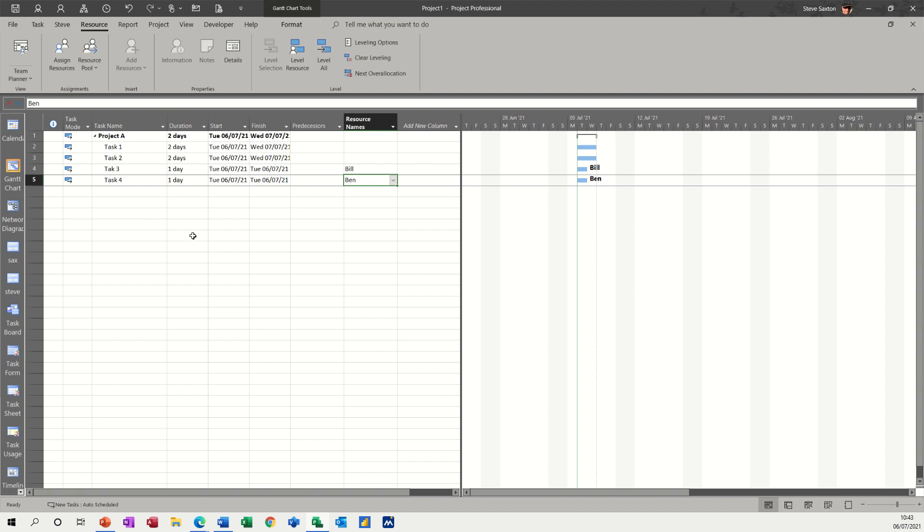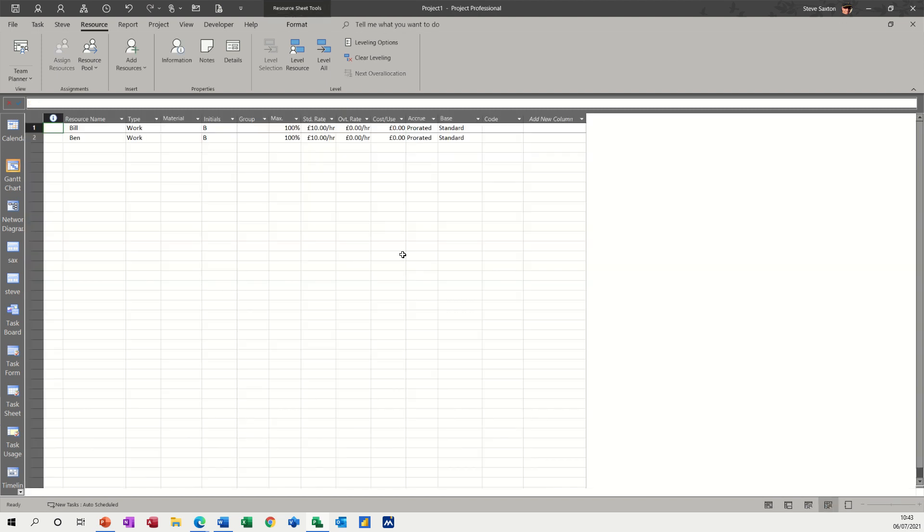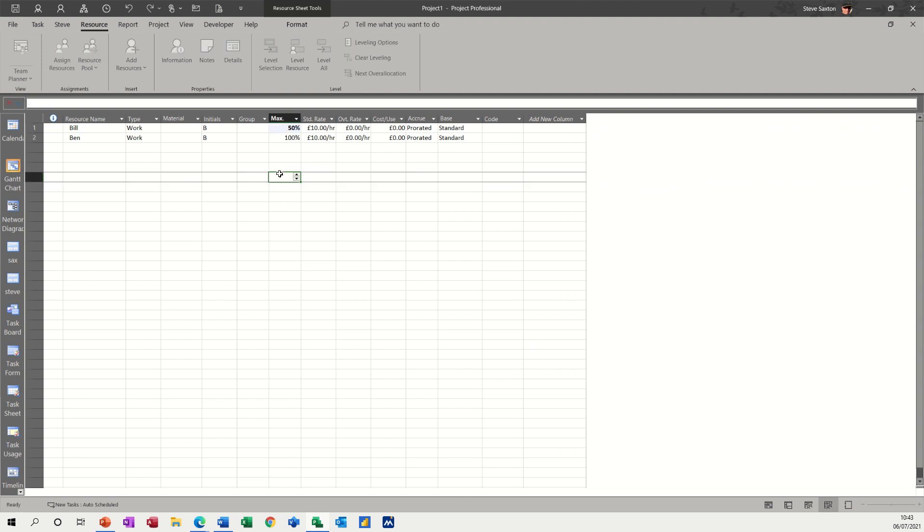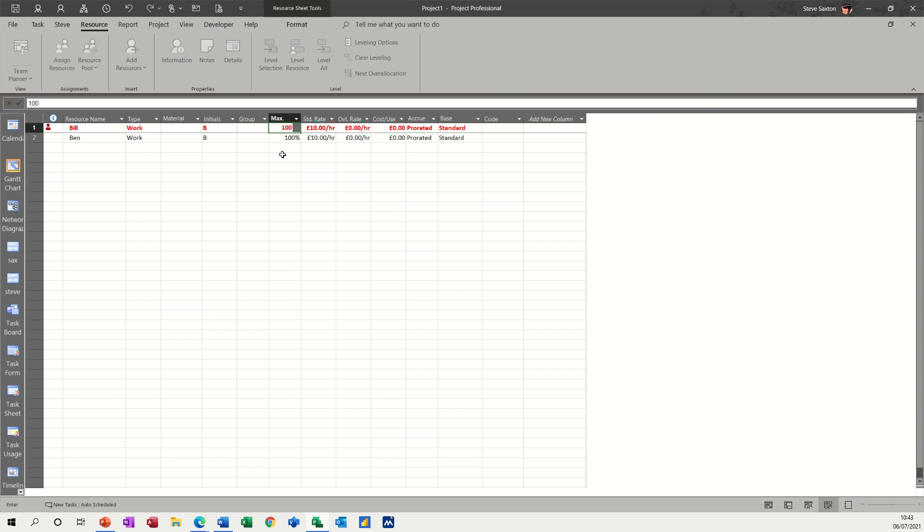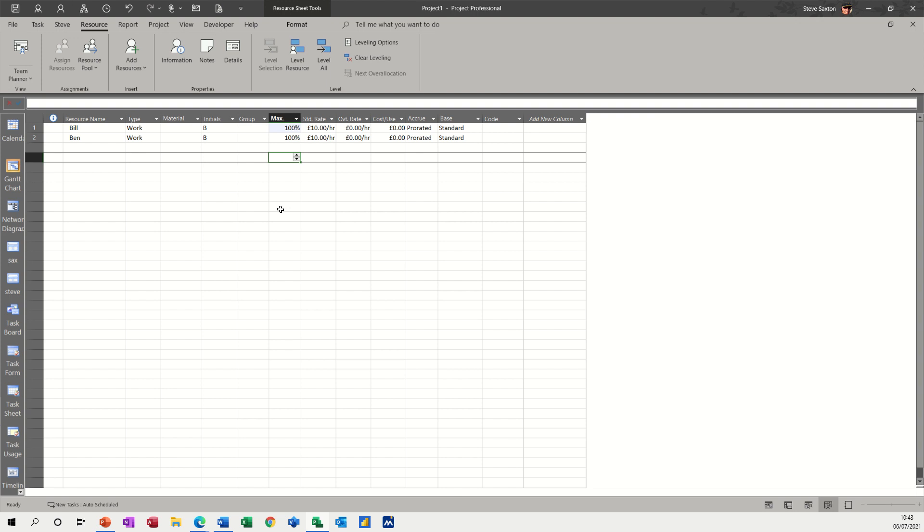So that's two different ways of managing resource availability. The third way is, of course, that they may not have been available for the full time. Anyhow, you might have only had them for 50% of the time. So that would be putting 50% there and then that makes him over allocated again. I'll just put that back to 100% because you don't always get somebody on a project for 100% of their time, eight hours a day. So that's all I want to talk about in this little video. So hopefully that was of use to you. And thank you for your time and I'll see you on the next one.